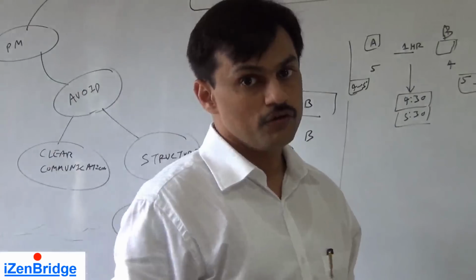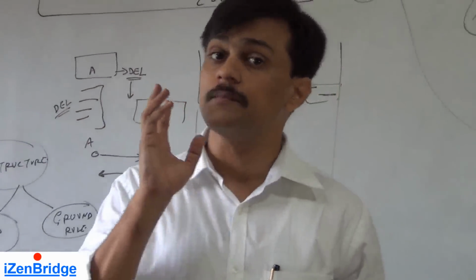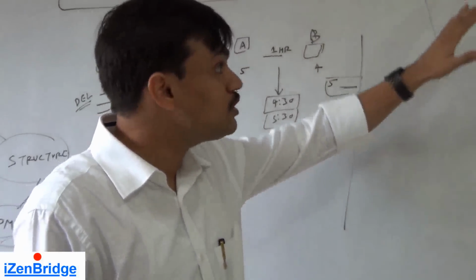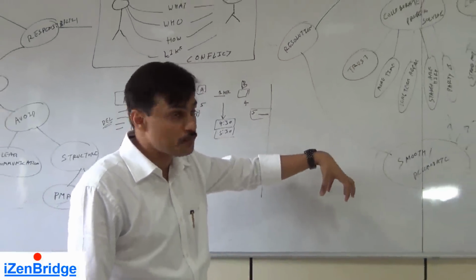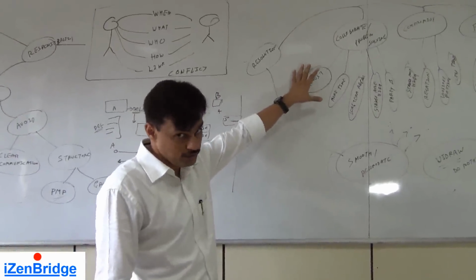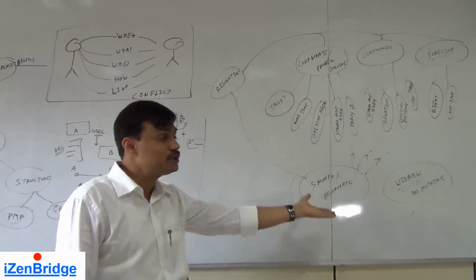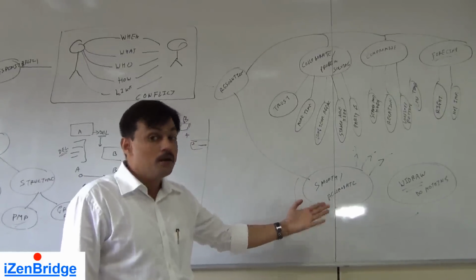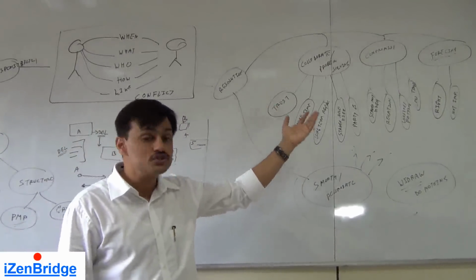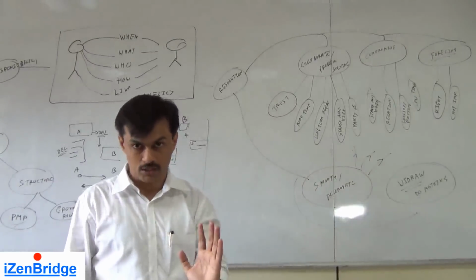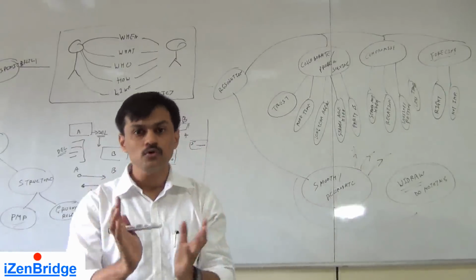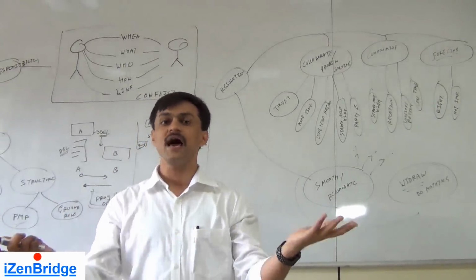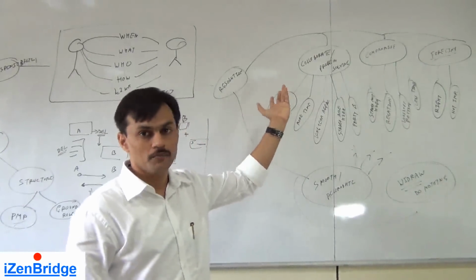So in our exam, we get some questions on conflict management. In general, we should focus on bringing the solution to the table by getting into the root cause of the problem, by following collaborate and problem solving. But before doing that, we need to create an environment where this can happen. For that, we may need to apply smoothing. But in some cases, compromise, forcing and withdrawal can also work. But if you don't get any clue about what the real situation is and you just need to pick which conflict management technique is the best, you pick collaborating or problem solving.